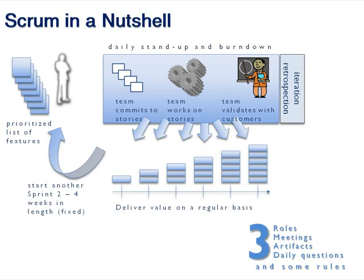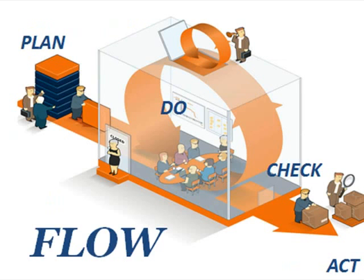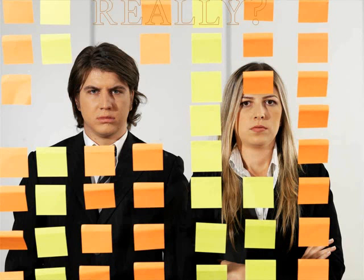Scrum is based on three simple things: you've got your product owner that prioritizes, the scrum master that's the team facilitator and coaches the team, and you have the team — those are the three roles. You have release planning, sprint planning, and a daily stand-up as the three meetings. The artifacts are the product backlog and the sprint backlog. The product backlog is the whole thing to be built; the sprint backlog is what you've committed to. You have burn-up and burn-down charts, and three daily questions: what have I done, what am I going to do, and what's in my way. It's a very simple, lightweight framework that's easy to start with in certain situations, and in some situations it's not.